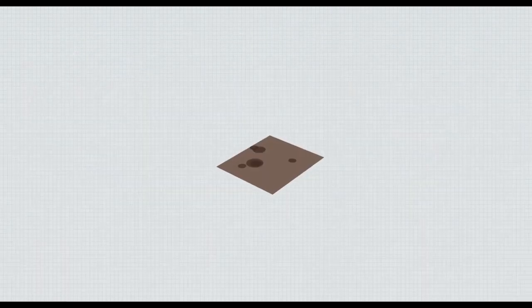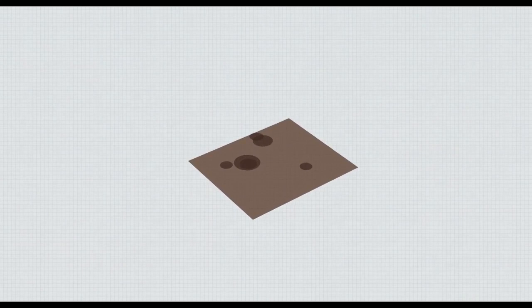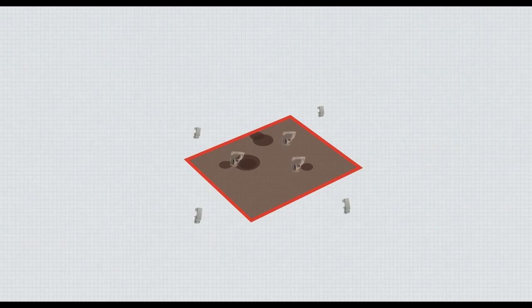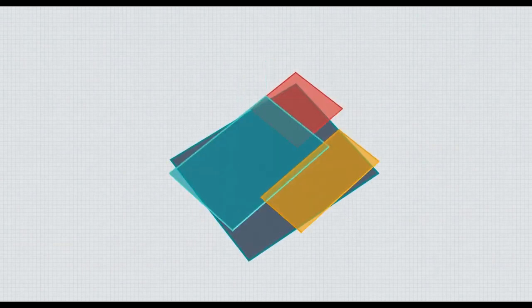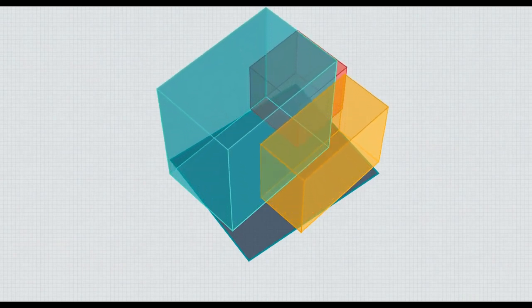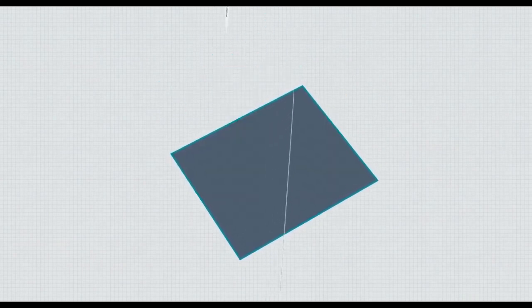The Quantum High-Rise project in central London is a massive urban regeneration project that exemplifies these challenges, comprising 3,300 residential units and 1.9 million square meters of commercial space. The development is constrained by a contaminated brownfield foundation with zero space for on-site material storage and a strict mandate to achieve net zero carbon emissions.